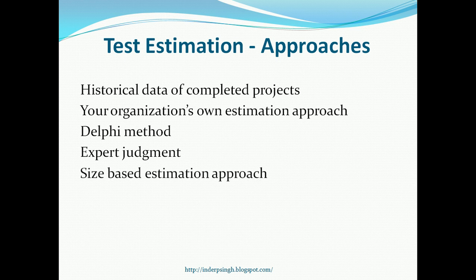The next approach is the size-based estimation approach. So you divide up the requirement into different sizes and then add up all those sizes, apply the conversion factor if it is available, and then from the size, you can arrive at the effort estimate.